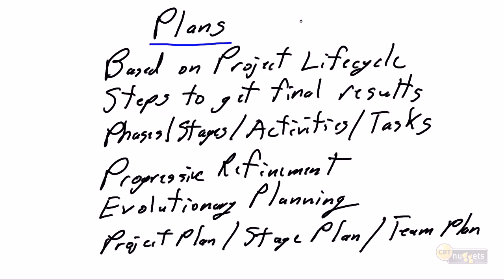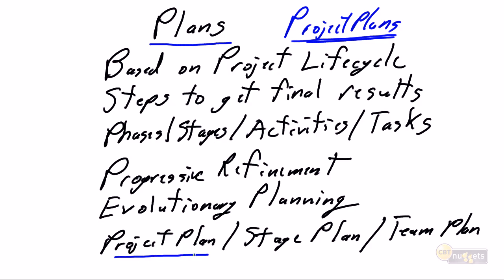And our next theme is plans, or project plans. And there's no surprise that projects need project plans, so it should be no surprise that Prince2 expects us to have project plans. But again, Prince2 has some specific nuances into project plans, and that's that we would expect to have our project plan delivered at multiple levels. We have our high-level project plan that we do at project initiation that defines the overall objectives and schedule and budget for the project.